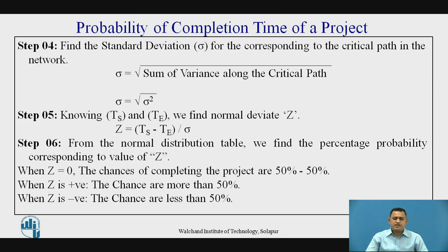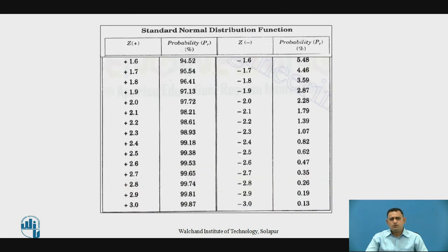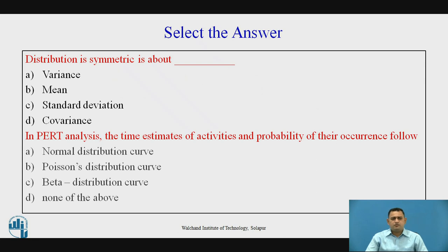In this table, the guideline states: if the z value is equal to zero, the chance of completing the project is 50 percent. If the z value is positive, the chance is more than 50 percent. If the z value is negative, the chance is less than 50 percent — meaning there is very little chance of completing the project as per schedule.